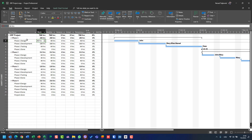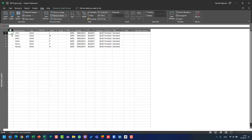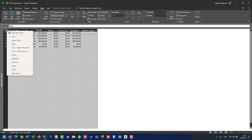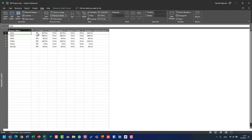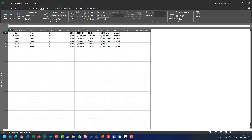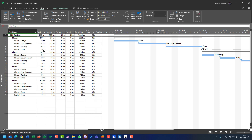Those were only three views shown — Gantt Chart, Task Usage, Resource Usage. But there is also, for example, Resource Sheet. I will see John's type of work, etc. If I say I want to see Cost, John on this project will cost $91,200, with no tasks shown. I can also see Work. So at each and every view, you can choose which table you want to see. That is the basic difference between tables and views.